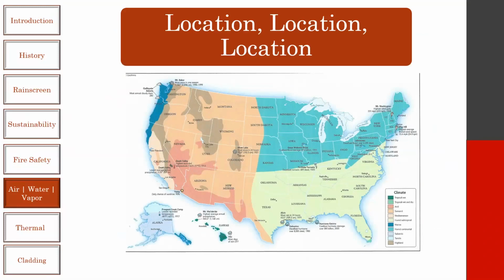The Mid-Atlantic kind of gets bid out differently. Some general contractors will remove that scope from, let's say, the rainscreen scope and just go to a waterproofing scope. Then they'll defer to whatever their setup is, whether they want a sheet applied. But again, then you're gambling on consistency. As we've talked to these waterproofers, they're basically saying we just go by square footage and plug in their rates. They don't care which product they apply.